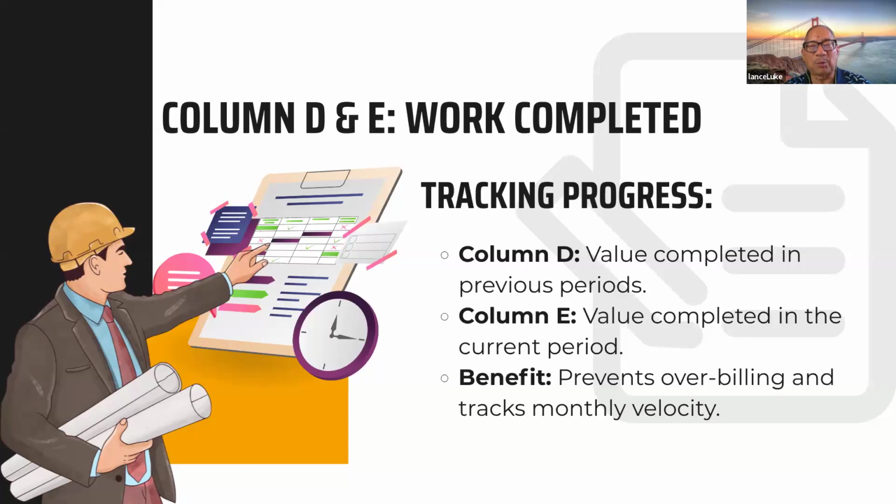Now, there are cases where the owner said, "Yeah, do it," and he agreed to it, but come to find out, he never agreed to the cost, right? Maybe the owner thought it was going to be an additional $2,000, but in the contractor's mind, it was $5,000. So there may be an issue there. I would not approve $5,000 until I had full documentation that the owner actually approved the $5,000 and approved the work being done.